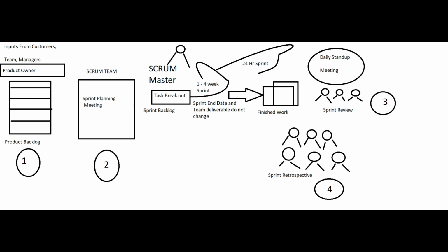The next question is whether, during your process, you are facing any issues, obstacles or impediments. If you have any issues while testing, you need to update these details as well. So the scrum master will ask what you did yesterday, what you plan to do today, and whether there are any obstacles or issues in the test process. We have to tell all this in front of the scrum master. So that is about the scrum meeting.